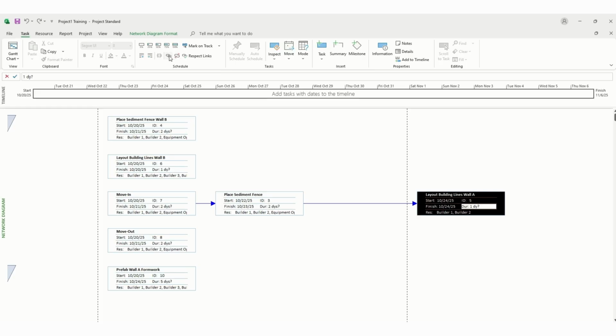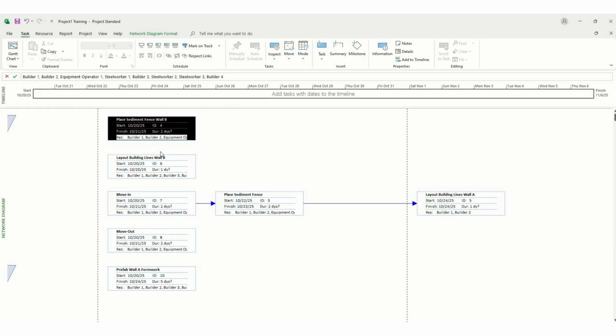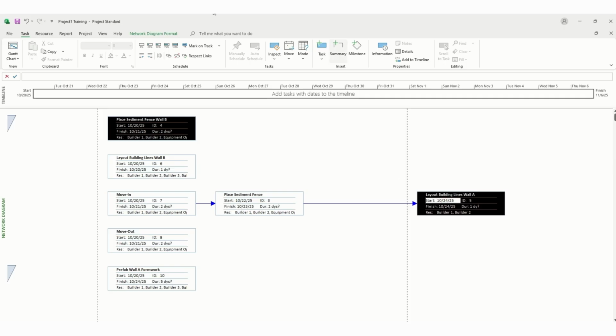Now let's say you had two you want to link. You can highlight it, come over here, highlight the other one by pushing shift, and you can say link, but it will do a link like that. So you would have to bring it over and show where you really want it linked. Okay, so you would take that and that, unlink it, and there you have it. Okay, that is how you would do it through the network view.